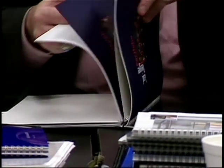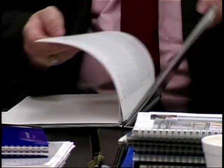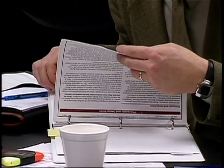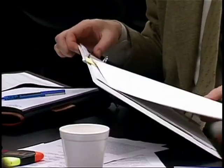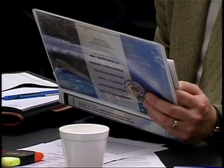Reviewers, in looking at past performance of the firms, should look at the ways in which the project met the project requirements. Did it meet the budget? Did it meet the quality required? Did it meet the schedule? Did it offer innovative solutions to the project? Were the solutions environmentally friendly? Was the customer satisfied with the final product? There shouldn't be a specific architectural style that we were looking for. Instead, we should look at the solutions that were presented.